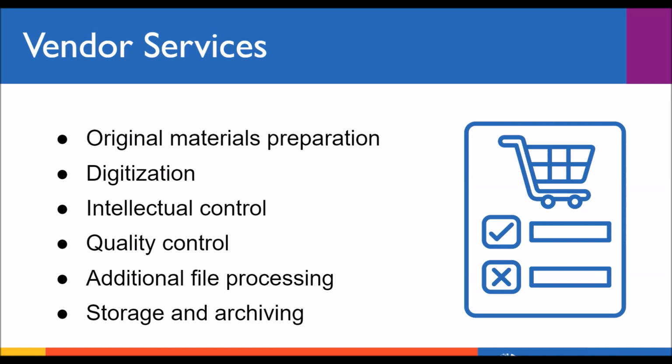If you do get anything rehoused, just be sure to talk to your vendor and specify how and where you want things labeled and whether or not you want the original housing back. So those are things you don't think about until you forgot to ask for those things back. Obviously, digitization services for a variety of different formats.